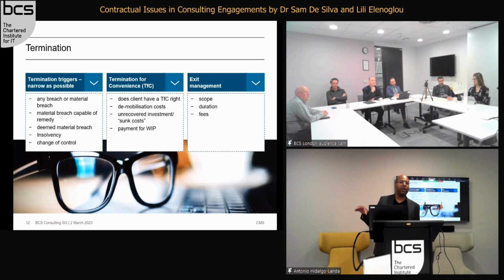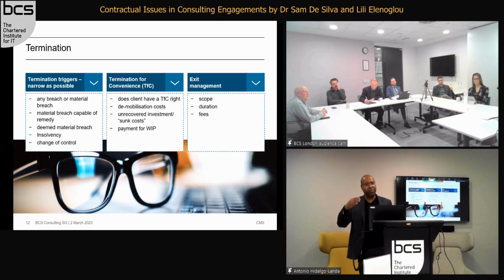What you may want to do is have some kind of escrow payment, where they put the payment into some kind of account beforehand, or basically they pay in advance. But it's very difficult for you to be a preferred creditor. I've seen really complex consulting engagements where a big four firm is the consultant. They would put in their consulting agreements a financial distress schedule. Effectively, if the customer's credit rating changes or bank guarantees change or there are various triggers, then certain things happen, like a notification to the service provider or money going into escrow. But those are for the really complex consulting engagements.